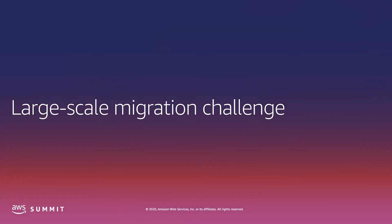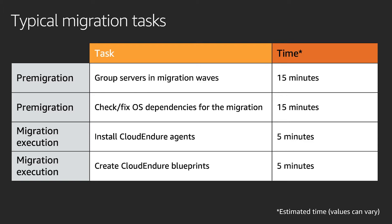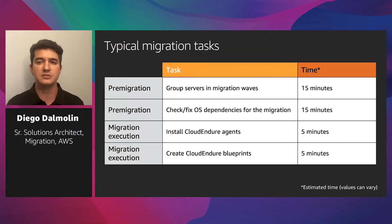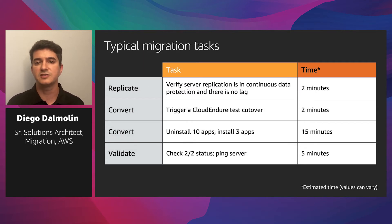Now let's talk about the challenges you could face during a large-scale migration project. For a typical migration, there are steps you would have to execute, and you may not be sure about the right order or what unexpected delays you could face. For example, you would have to group servers into migration waves, check or fix operating system dependencies, install CloudEndure agents, create CloudEndure blueprints, check if servers are replicating as expected with no lag, test your migration, and eventually remove unused drivers or install software such as a new monitoring tool.